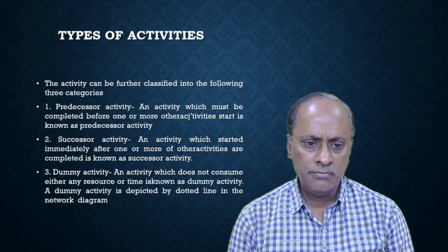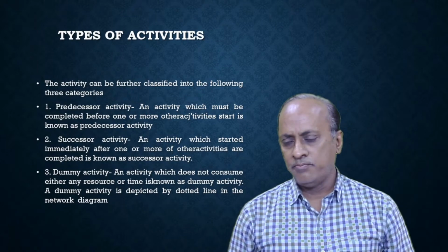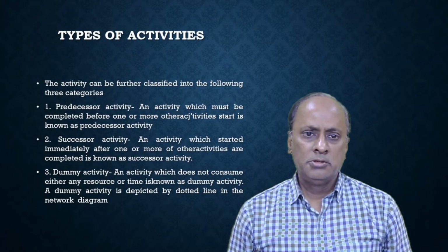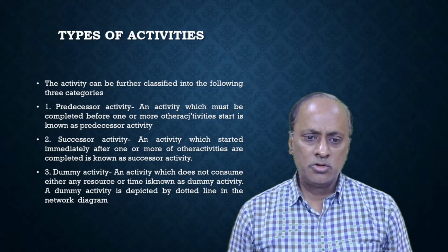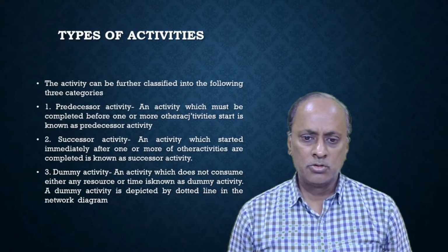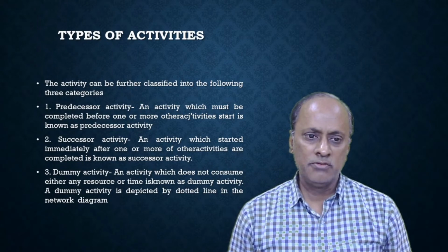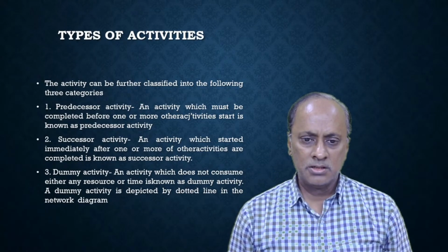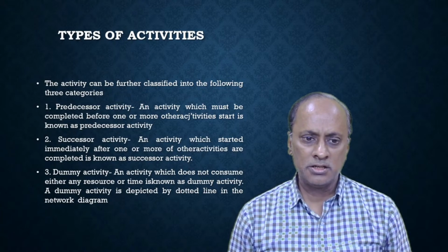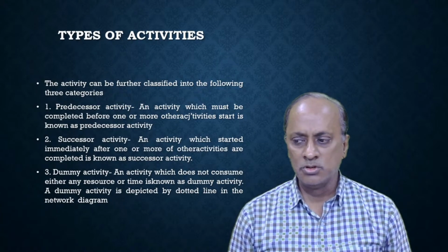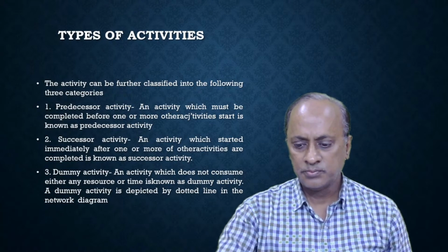Now, what is the role of dummy activity in a network diagram? The role of the dummy activity is to maintain or to show the logical sequence of the various activities. Sometimes, to maintain the logical sequence of the predecessor and successor activity, we use dummy activity.